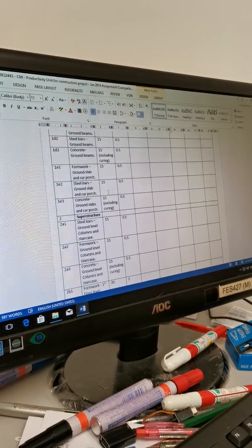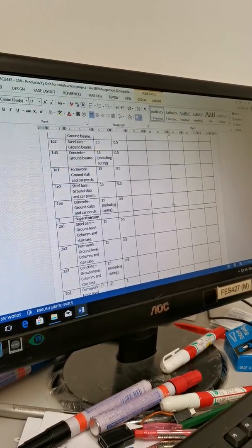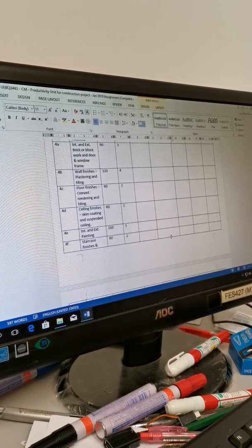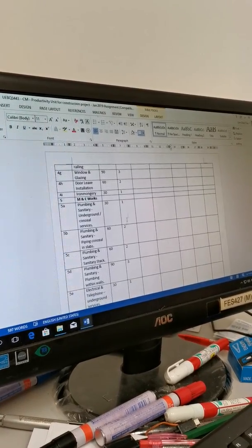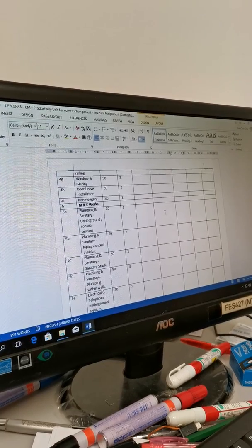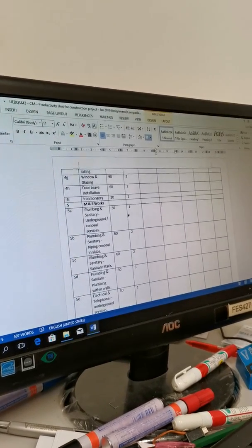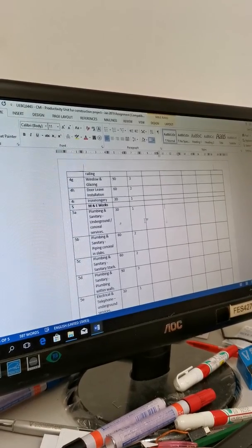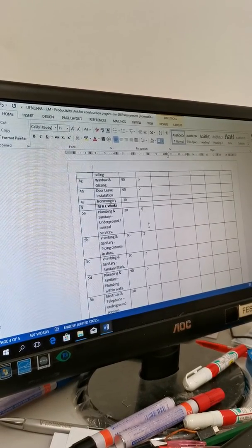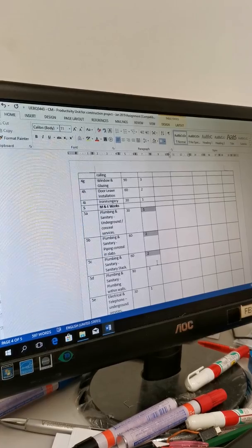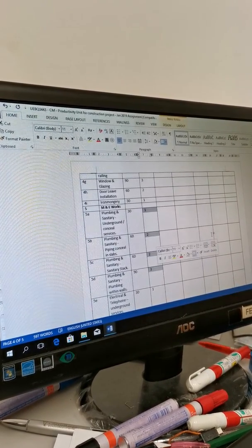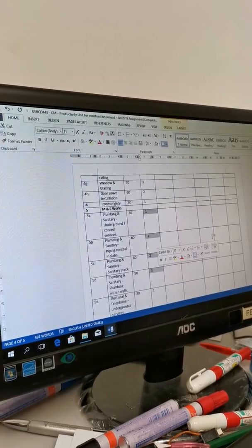So for those people, you find that certain thing is not there, you put a dash. Okay, or certain items there, let's say NSEs to do, then you put them by NSEs, especially M&E. These are all details. Let's say this one, plumbing, you put NSEs. Okay, you put a dash. Now you don't have quantity anything, NSEs. But then here already telling you how long to do it already. For the plumbing. That means add together 1, 2, 2, 3, 8 days. So 8 days for the plumbing for 1 unit to get it done.